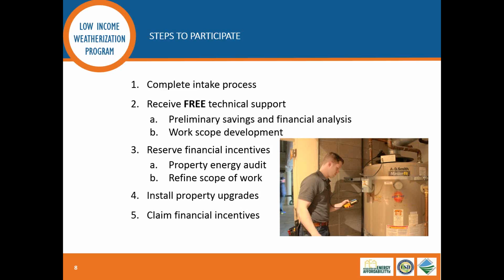After the technical support process is completed and the owner has agreed that this is something they want to pursue specifically, that's when we ask for that good faith deposit and come out to the site and do a more rigorous technical analysis, where we'll be looking at exactly what the existing conditions are, doing a walkthrough of the site, viewing a sample of the interior units, and developing a more robust scope of work that we will then attach an incentive reservation to.